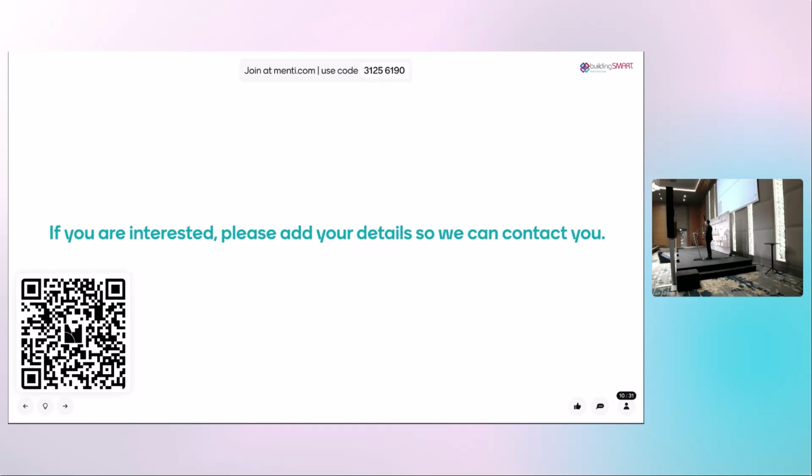Yeah. But to answer the question from Mariska, I think it's, do you mean the parts that are not being modeled at all, like the information that is not in the model, or the information that is in the model but is not possible to check with IDS? What Hans is referring to is we also require documents to be delivered. And those documents are not part of the IFC file. We can check them, but then you have to somehow either use linked data and add the document UUID in your IFC file, and then you can just check whether the document UUID is covered. It still is not doing a check whether the documents are being delivered.